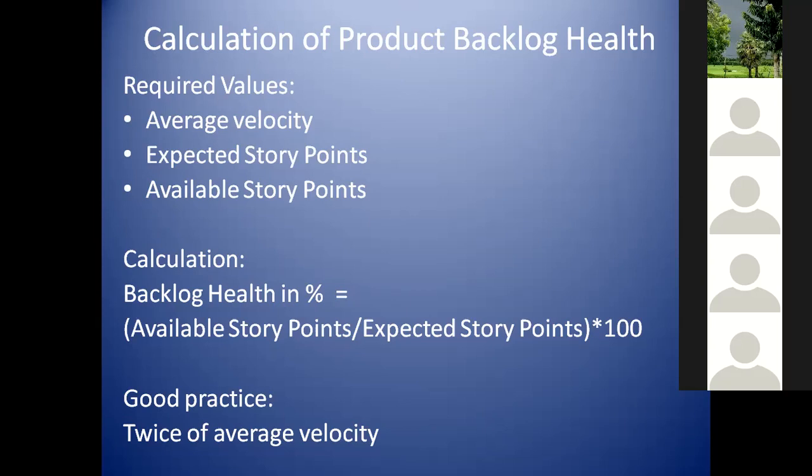It is not necessary that this happens only because of holidays or the unavailability of team members. Sometimes you are going towards the closure of your release, you are very close to your release, and you want to dedicate your team fully, and you don't want to take your team away for refinement meetings and spend time on refinement sessions. In that kind of situation, if you have a strong backlog, if your product backlog is really good, you can confidently say, guys, we don't need any refinement meeting, we can go ahead and do the work we are doing, and let's catch up in the upcoming weeks, because we will still be able to manage. This is why the product backlog health is very important.